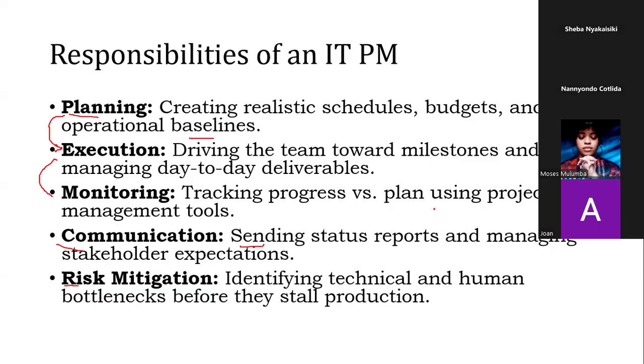You could literally find that there are very many records kept in a backup on the ZVAST system. But then, if you're creating a new one, if someone is holding the data very well and they're coordinating the groups very well, they'll need to think about the migration bit of it. But if they don't do it, then they'll end up losing the data. So data loss is one of them.